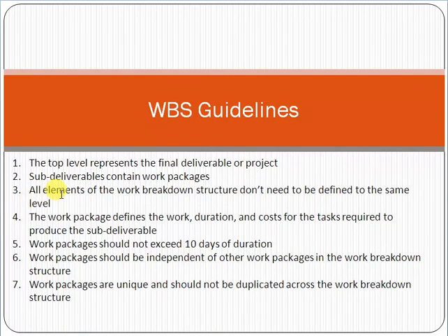Then friend, all elements of the work breakdown structure don't need to be defined to the same level. This is very true. The work package defines the work duration and cost for the tasks required to produce the sub-deliverable. A work package should not exceed 10 days of duration. Remember one thing: whatever work package you are deciding, generally, as per the standard, it should not exceed 10 days, because if it becomes more than 10 days, it is better to subdivide it further.